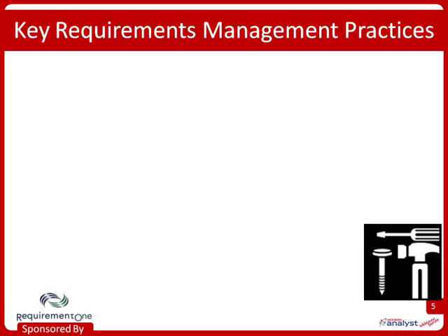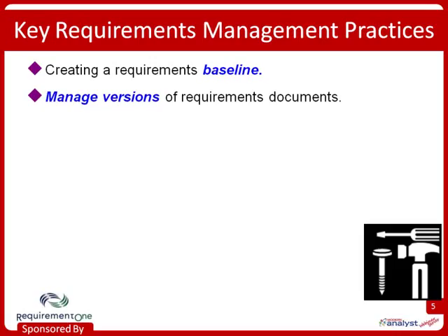So let me quickly go through the basic practices here that I think can help you achieve these requirements management goals. And in the rest of the presentation, we'll take a look at each of these in some detail. The first thing we need to do is establish a requirements baseline. This is the foundation for the work that follows. And this is the agreement that we forged among the various key stakeholders as to just what it is we're going to be building.